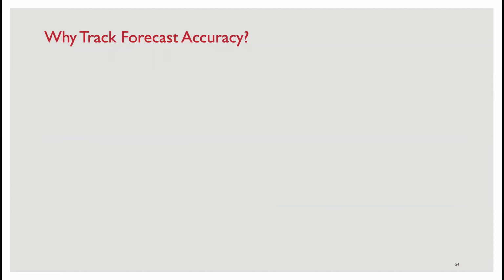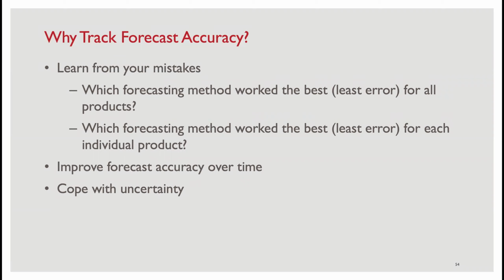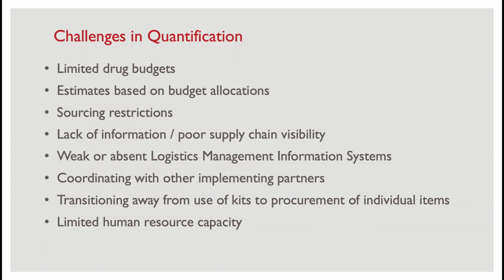We also, in our monitoring, want to track our forecast accuracy. We want to see how close our forecasted consumption was to our actual consumption. If our forecasts are too far off, then next time we want to have a better look at the data that we use to produce those forecasts and see if we can improve our forecasting methodology as well as the data we're using for those forecasts.